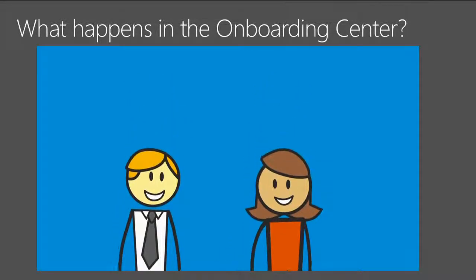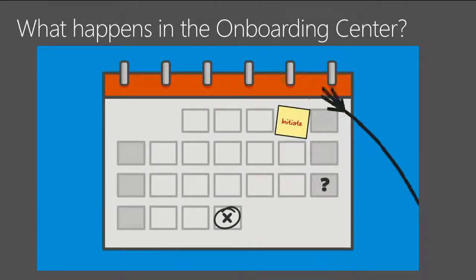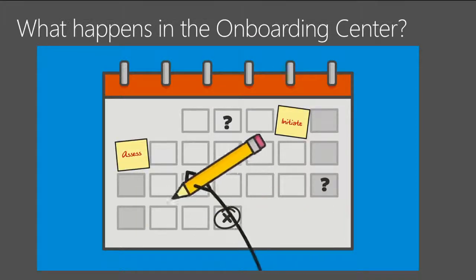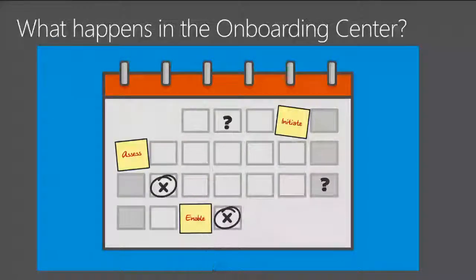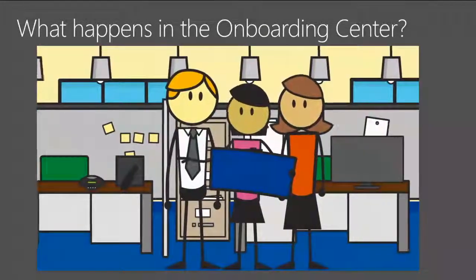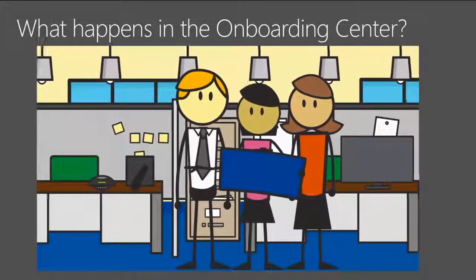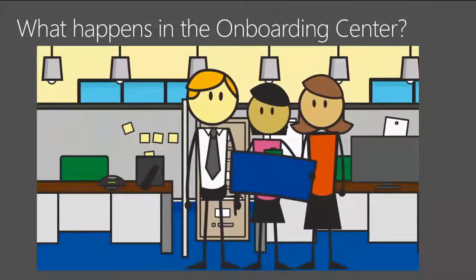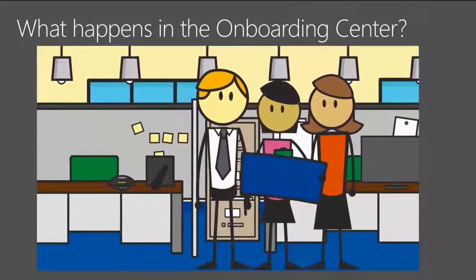To get you up and running on Office 365 as quickly as possible, we'll also use the kickoff meeting to create an onboarding plan. We'll work with your team to build an onboarding timeline, confirm remediation timelines, and plan for any optional support you may need. Together, we'll use this onboarding plan to stay on track for an easy, seamless deployment. Once you've initiated onboarding and had the kickoff meeting, it's time to begin assessing your infrastructure.